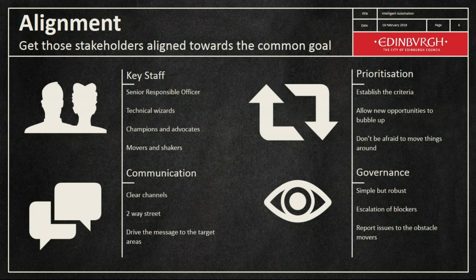Though I would say watch out for scope creep, where you've established what the process is going to be, you build it, you test it, and right at the very end someone says, oh, actually, it'd be great if it could do this. That's a bit of an issue, so try and get all of those pieces of information out at the start. What you can do is build that process to the initial requirement, and if there are additional asks, you can build that into later development cycles, so you'll get something out of it. It may not be 100% exactly what the business team wanted, but you should be building to their original specification. But you can always add that into later cycles.